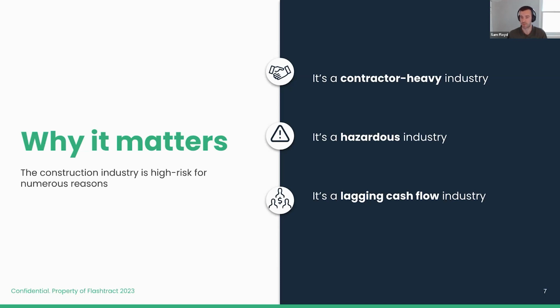So when an accident happens, we want to make sure there's proper insurance in place so that the subcontractor doesn't have to close up shop midway through, potentially disrupting our project, and then we have a lien filed on our job because of an accident and improper insurance in place.